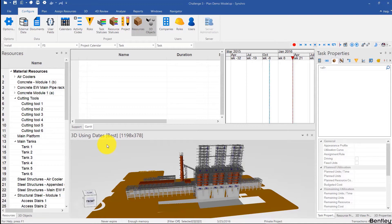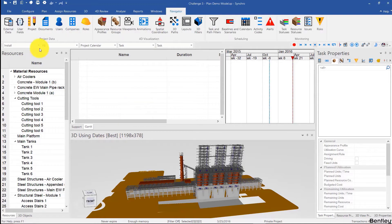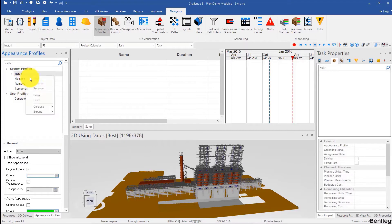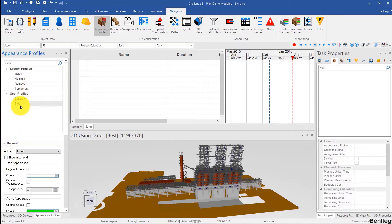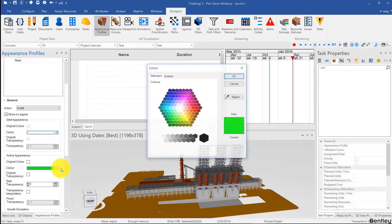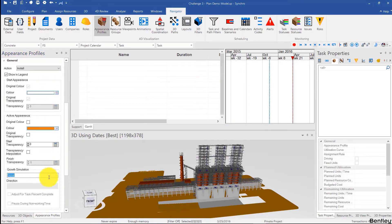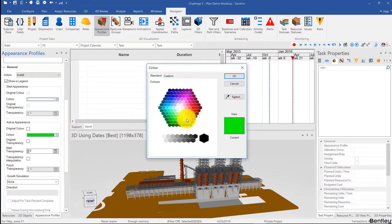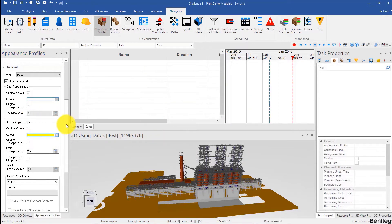First I'll start by creating some appearance profiles. I'll go to Navigator, Appearance Profiles, and create one for concrete — type concrete — then create one for steel. I want to show these in my legend, so I'll click the Show in Legend box. For concrete, let's make it orange and grow from left to right, and then for steel let's make it yellow and also grow from left to right.